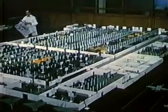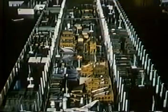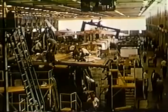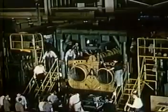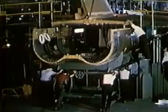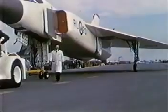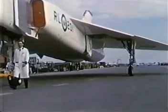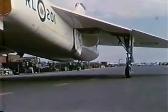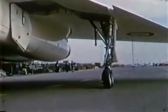The whole project was proceeding to a tightly integrated schedule, and it was a complex operation demanding a very precise analysis of manpower, machine, and facility capacities. From the master schedule, detailed programs for manufacture and assembly were prepared, and a smooth, pre-planned release of manpower from other programs to the expanding Arrow production line was effected. The success of this careful planning may be judged by the fact that the first Arrow took 20% less man-hours than projects of similar size and complexity produced elsewhere in North America.